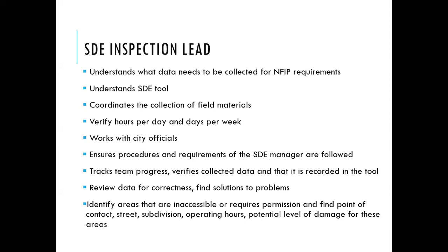And then you're coordinating the collection of field materials, making sure that your teams are all trained up and know what they're doing, and that there aren't any gaps or overlaps in their inspection plans, so all those properties are covered. Then you're working with city officials, making sure they know what's going on. Maybe a police escort might be helpful. I've heard of communities doing that just for safety purposes, because sometimes you might need special permission to enter a property. Sometimes people don't want to let you in their house, so we want to make sure we're being safe.